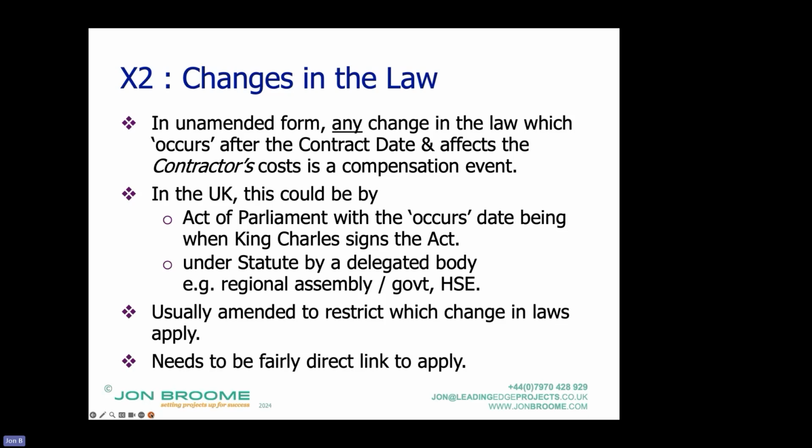For delegated bodies, it's when the law is changed by statute. So that could be a regional assembly or government, so the Scottish Parliament or Welsh Assembly or the Northern Ireland one. It could be the Health and Safety Executive. Quite some time ago, the standards for doing structural steel changed from good practice to basically becoming the law. And if the contractor was doing the lesser standard, then suddenly had to up their game, they would have been entitled to an additional cost.